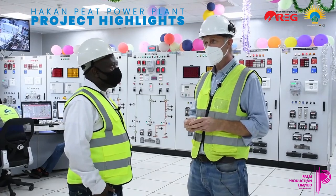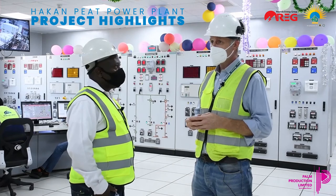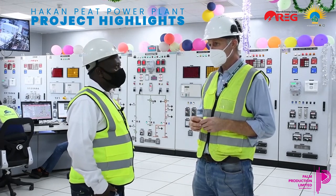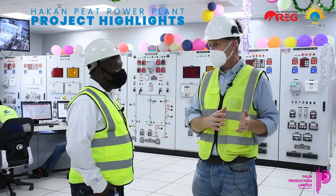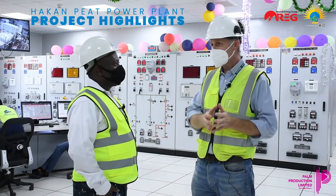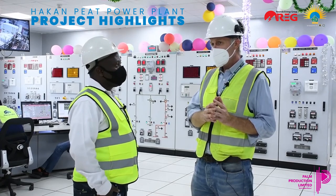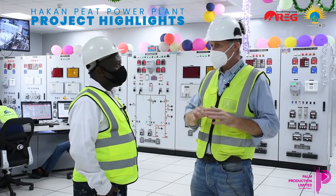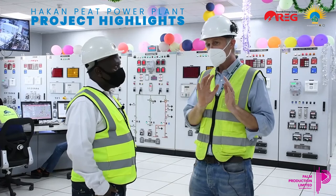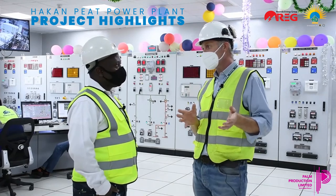It's taken us 4 years to construct, and actually took longer, 5 years, to organize the financing for the project, to get from the initial contact with Rwandan government to interest, to pricing discussions, power purchase agreement, and then organizing the financing with all the pre-feasibility, the feasibility. We even had to do 1 year of operation on the peat lands to prove to investors that we could produce the peat.